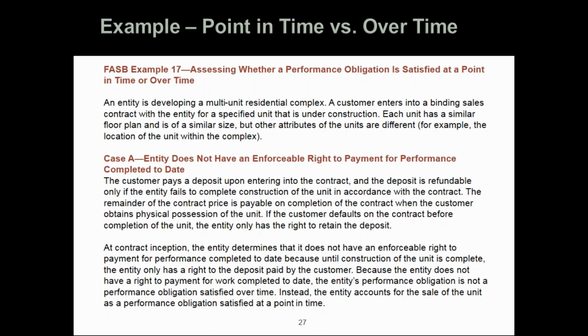So this gets into a question of, so what do we do with our revenue here? Do we recognize it over time, which is often the case for contractors who are going to use a percent complete methodology to measure their progress towards completion of a project, and they'll recognize revenue over time based on the level of effort that they've put in compared to their estimate of the total? Or would you have to recognize revenue at a point in time, which is going to be at the end?